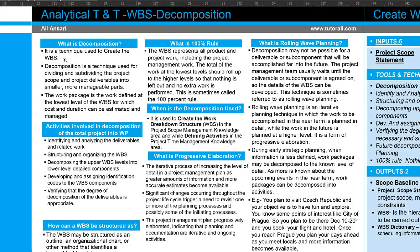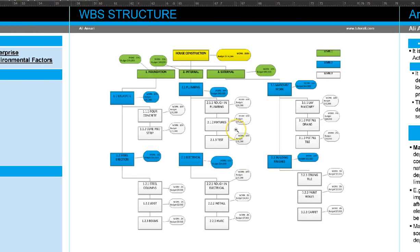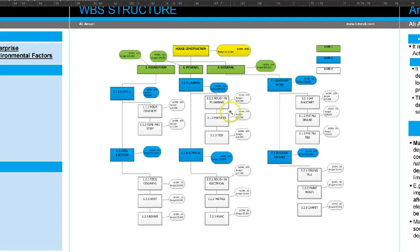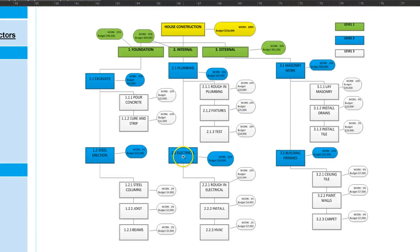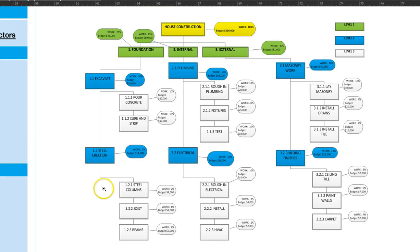Decomposition is a technique used to create the work breakdown structure. A work breakdown structure defines the total scope for the project — everything that needs to be done for the project to be successfully completed. In this example we have a house at the top, broken down into three different levels: level one in green, level two in blue, and level three in white. We start with the house and break it down into different tasks.